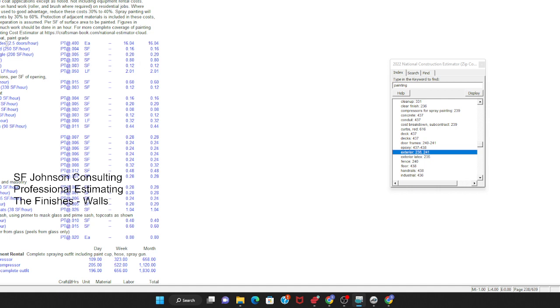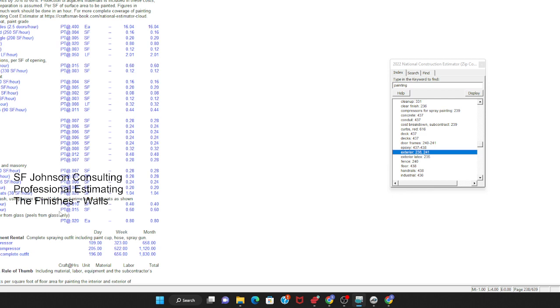So exterior surfaces per coat. Okay, so you're going to times it by what? 3. You're going to times everything by 3. Okay, because you're doing 3 coats. Keep that in mind. These called 0.004 would be 0.01, well, 12 for a ceiling per coat.